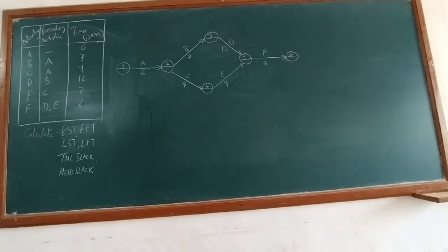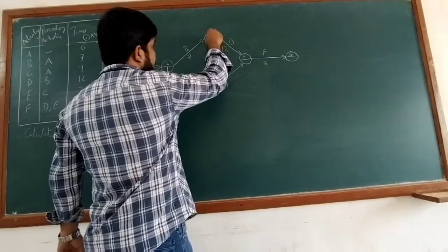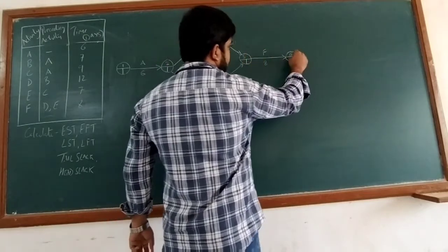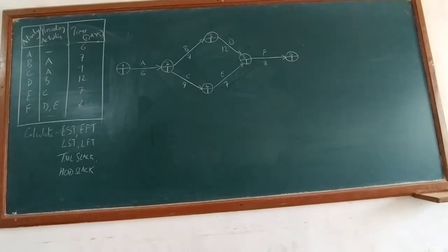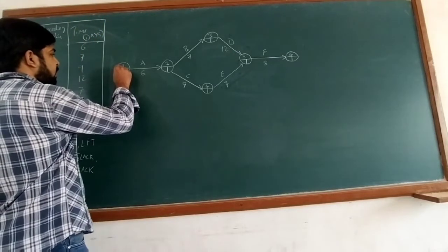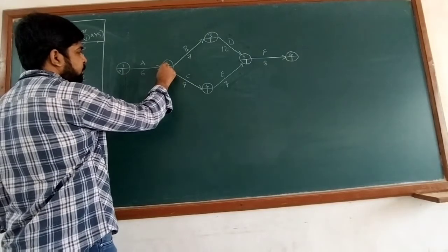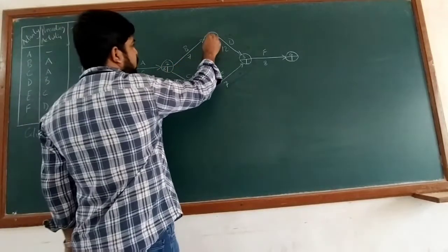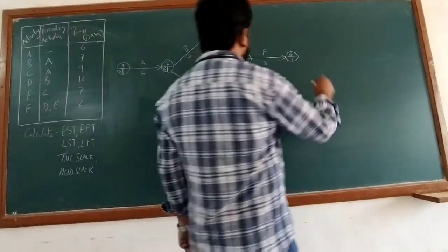Now let's identify the paths in the network. We divide every node into two halves. Starting the forward pass: node 1 has value 0 since activity A has no preceding activity. Then 0 plus 6 gives 6 at node 2. Then 6 plus 7 gives 13 at node 3. Then 13 plus 12 gives 25 at node 5. And 25 plus 8 gives 33 at node 6.